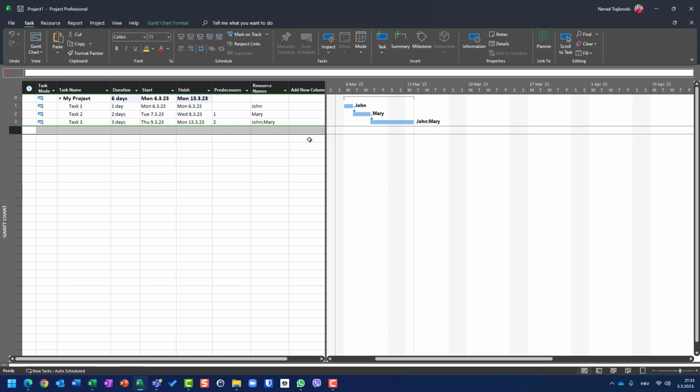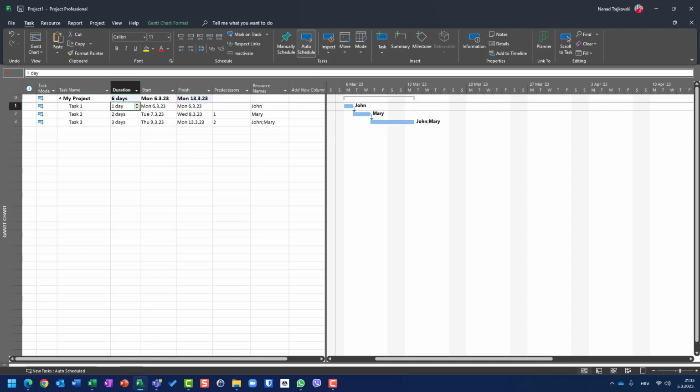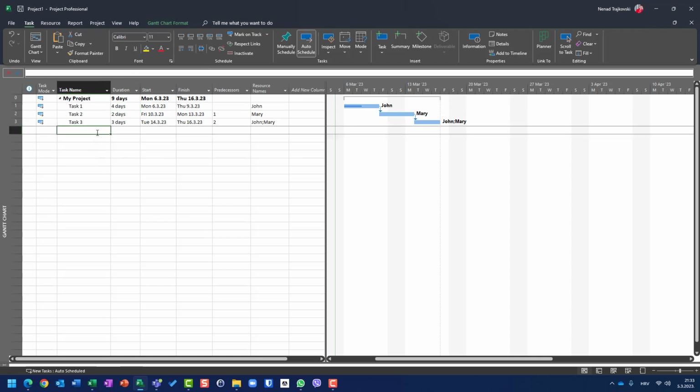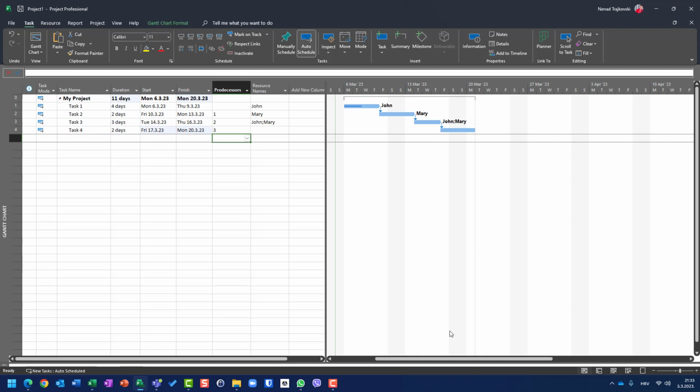For that purpose, I created this schedule, this baseline, and I put after that task 1 will have 4 days duration, and it is 50% done. And then I want to put task 4, but I want to see in my baseline not the actual start, which is supposed to be on Friday, but Tuesday, as I showed you before. So what can I do?